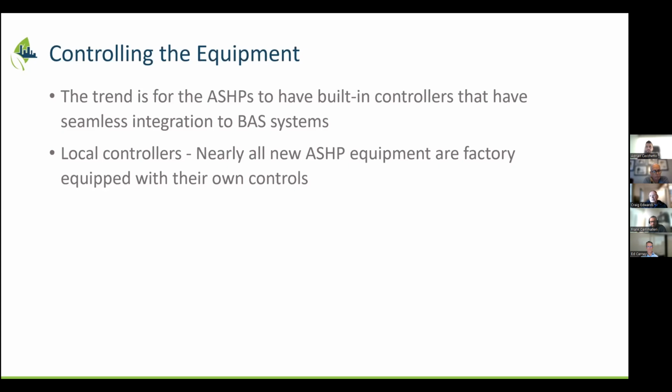And then we find we have to come back afterwards and see how the equipment's operating and how it's integrated with the building. And we have to rewrite a lot of the programs and the sequences, following up on these projects a year later when we find out that the heat pumps are cycling too much and we're having other types of control issues. So, it's not a slam dunk. It's definitely a challenge that everybody has to accept and embrace.